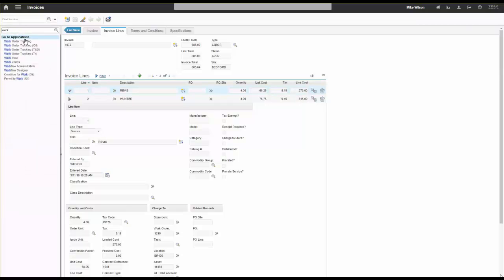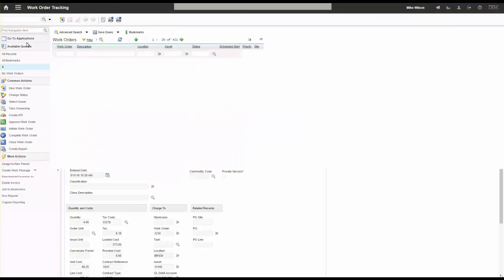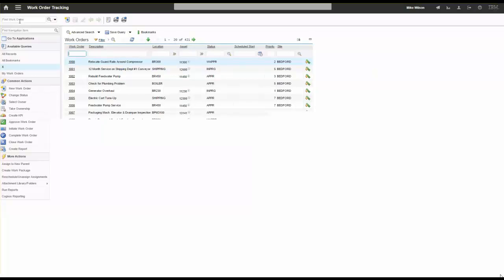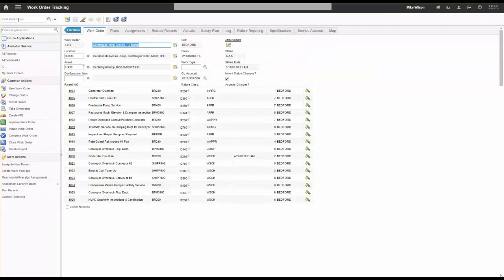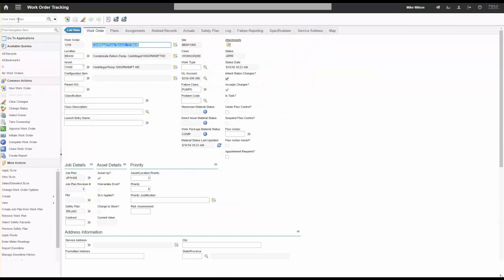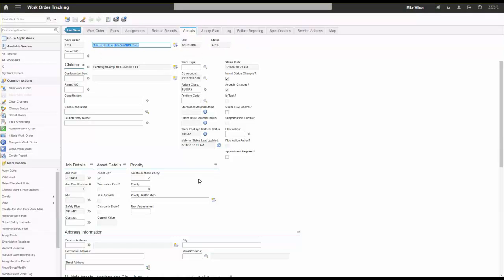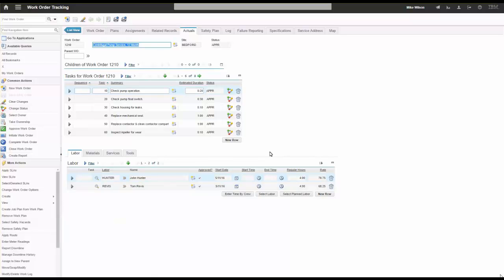Going back to work order tracking and work order 1210, when I look on the Actuals tab, I have those labor entries. They entered it in labor reporting — maybe that's the only application they have access to as contractors — but that information comes back to the work order. I have my plans and my actuals, and I can do all my analysis at the work order level. That's how we would do it with labor rate contracts.